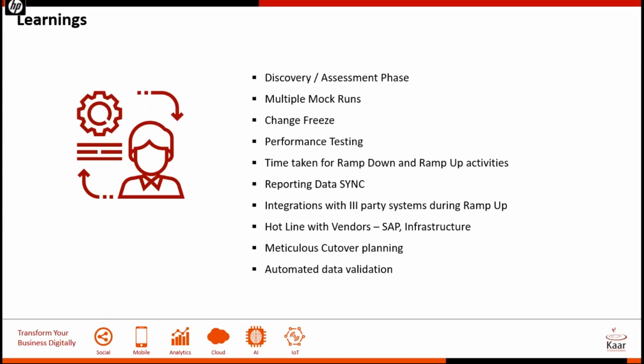One, it might not be applicable in the S4 landscape. And 2, when you have to do it on the S4 landscape, you'll have to do it manually, and you're bringing a change to the whole process. So let's assume you allowed a couple of company codes or a couple of new configurations to go into production after you've done development. Now, when you take that copy and do your QA, you're working on a completely different set of parameters. So the earlier you do the change freeze, the better off you are.